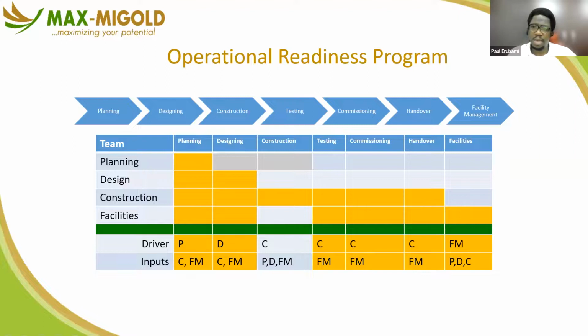As the FM, ensure that first there is a change management process that is robust, built into the contract, so that people cannot just, at the whim of an electrician not feeling like running cables for a long distance, decide to take a new shortcut under a floor. They will not just do it because it feels like it, right? A robust change management system built into the contract will ensure that certain people review it, so you must give enough reason for that change request. It's reviewed by certain people, approvals are multiple, right?